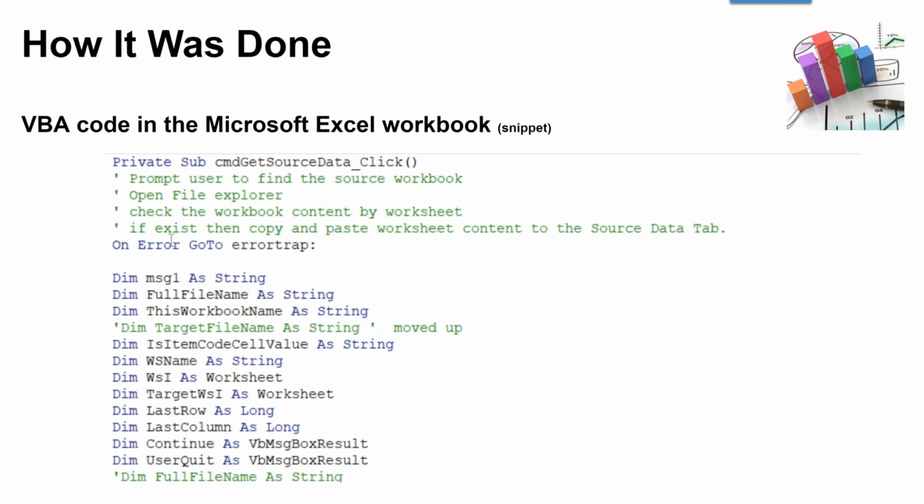We also embedded that merging capability, which was very important. Most of the organizations do take a very extensive view of their estimate, and then they consolidate those estimating details into line items to manage the project. And the last piece that we incorporated into the workbook itself was that validation process of being able to take all those cost codes and make sure that they were going to roll right through the import stage.